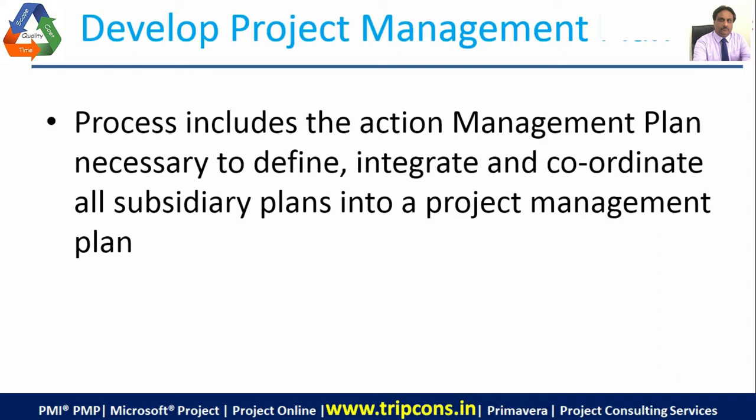All this will go into the project management plan. Like in the project management plan, there will be a section within the document, say cost management. So you would describe in the beginning how the cost will be calculated, what will be the estimation, what are the sources of cost estimation data, what are the rules, regulations, procedures, standards which are applicable on the estimation of the cost, and what are the roles and responsibilities of various people involved in cost estimation. Now, what is the benefit of this PMP document? The benefit of the PMP document is that it serves as a guidance throughout the project.